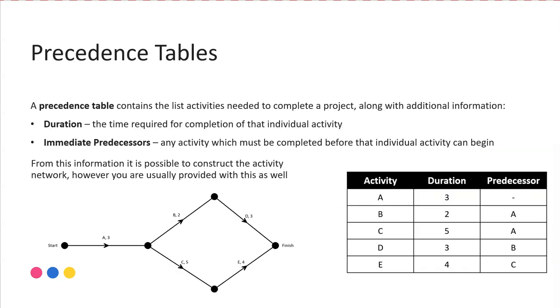When we're looking at these precedence tables, there's a number of things that may be included, but the most common and the most useful things are the duration, the time it takes to complete a particular activity, and the predecessors or immediate predecessors. The immediate predecessor listed in the table, if we look here for activity B, we're told an immediate predecessor is activity A. So that means visually activity B cannot commence until activity A has been completed.